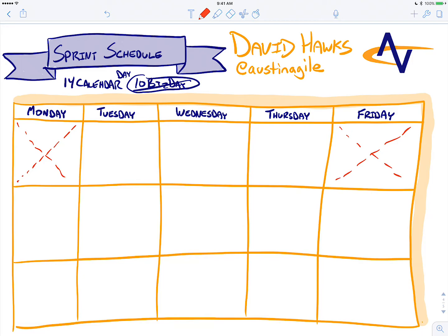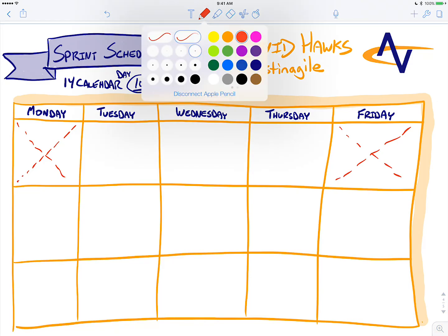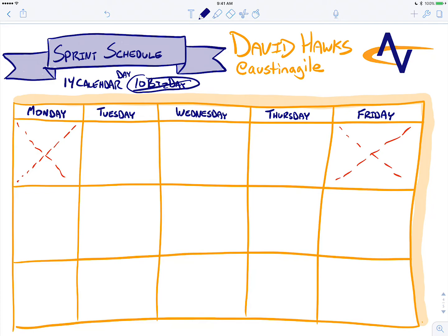We also do not recommend that you start or end sprints on Mondays or Fridays. The reason for that is if you're starting and ending a sprint on Mondays and Fridays, that means you have a lot of the Scrum events happening on Mondays and Fridays. And we have a lot of holidays, we have a lot of vacations, people out on Mondays and Fridays, so we don't want to have those events happening on days where we're maybe not as focused as is maybe Monday morning or Friday afternoon, as well as that we might have a lot of the people consistently out on our team. So what that means is we'd like to start our sprint on usually Wednesday or Thursday. That's what we typically recommend for a 2-week sprint.